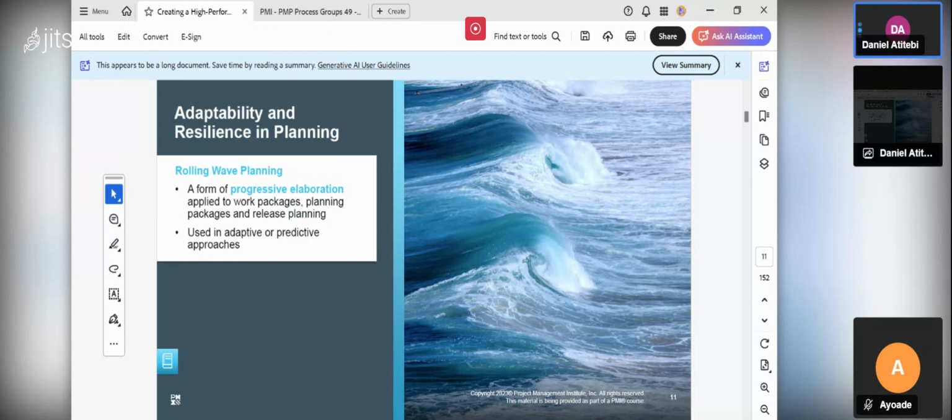Then I can also assign resources to those activities, human resources and non-human resources. I can also do my costing from those activities. Because if I assign an activity to you, maybe you are four persons who will be doing the digging of the foundation. That digging, maybe it's going to take them 3 days, and they're going to work for 8 hours in a day.